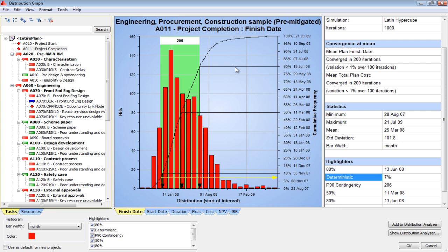We're 206 days late. Let's look at the inputs. Are any of the inputs wrong at this point? If we can't point to the inputs being wrong, then really what we're looking at is something's wrong with the project and we need to take corrective actions. So let's look at the bad news and see why it happened. If the inputs are right, then the answer is right, then we need to take action. So if we sweep it under the rug, this is probably going to be what happens to us. So it's really a proactive measure.